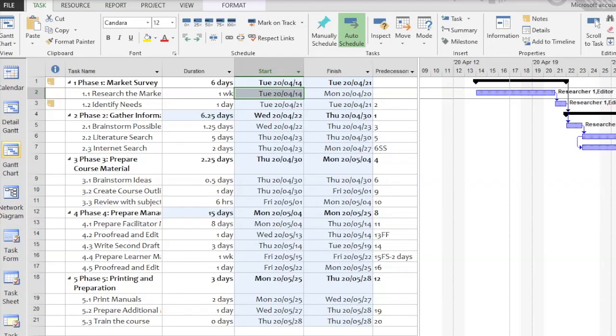In this lesson we're going to learn how to track a project. As you can see, this project started 3 days ago. I can work that out from comparing the start date of the project with the dashed line that is out of context. Not the normal dashed line to indicate the middle of a weekend, but a dashed line in the middle of a week that indicates the beginning of a project. In Project 2010 it is red, and in Project 2013 and following it is green.